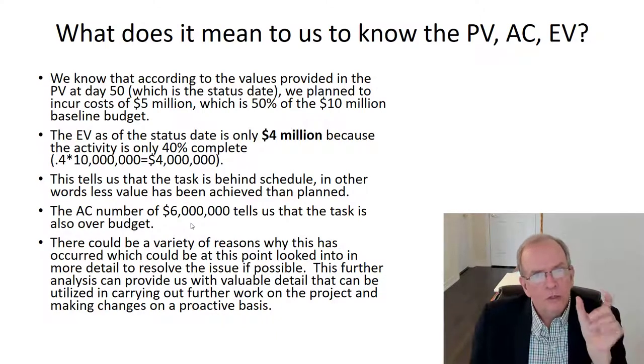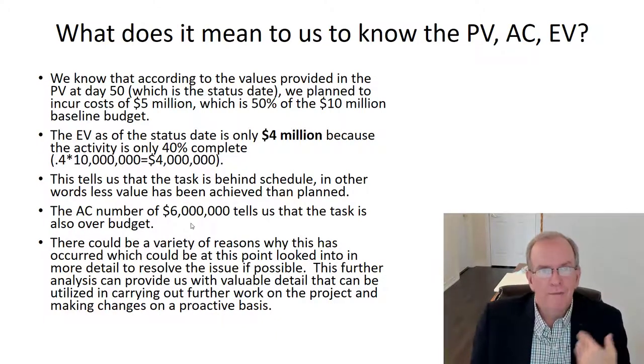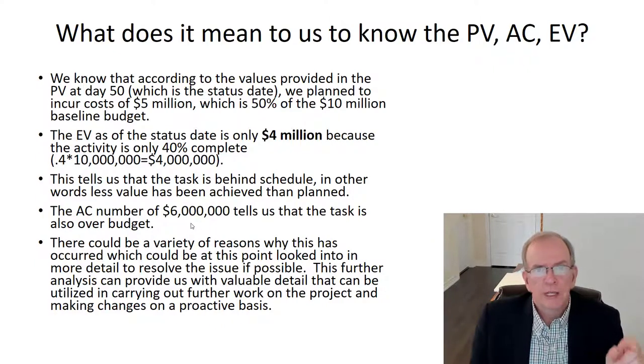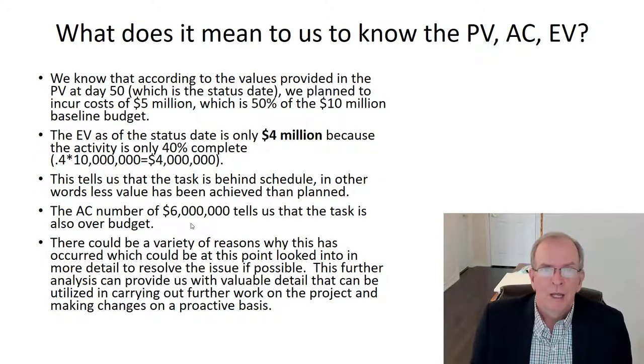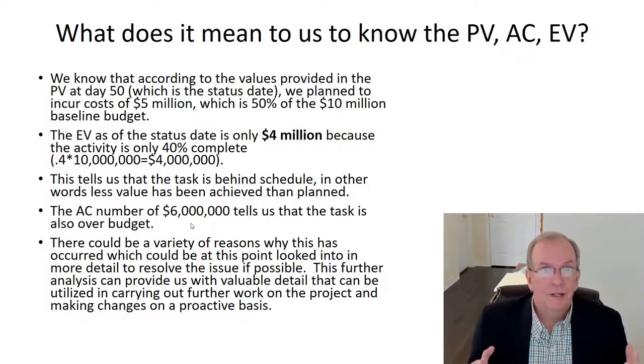Month by month, you're seeing these and getting these flags, and that's giving a lot of attention to those areas. Especially, say you're doing a big infrastructure project, it could require hundreds of thousands of cubic meters or cubic yards of earth to be moved, and you're seeing that there's a productivity issue in there. Well, that's where now's the time to work on it, because if we don't, we can also measure and see how this trend will play out on the rest of the project, which can give us valuable data that says, get your act together sooner, what's going on.